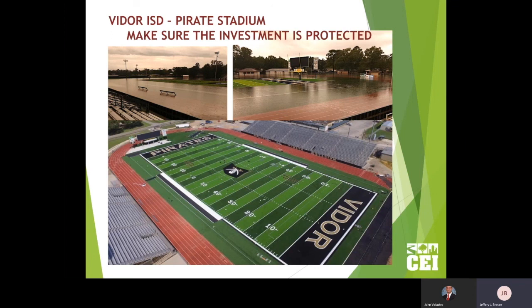But Imelda struck 3 days after they got their substantial completion, and you can see it left them underwater one more time. This is actually the day after these pictures from the hurricane. Water still in the whole community. But 1 day later, they were back to having no water there and only little skiffs of rubber down the side, which for a brand new field is pretty typical anyway. So they had no damage to the field, took an hour's worth of grooming, and they were back as if it never happened. So it made a big difference to them.